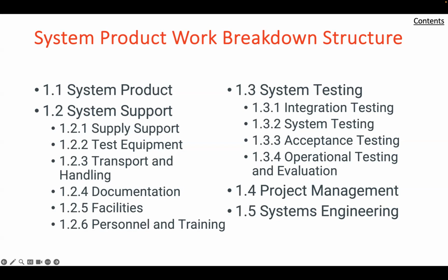Also, decisions have been made, at least tentatively, regarding outside procurement of elements of the system. Accordingly, the level down to which the WBS needs to be defined in detail should have been established. It is, of course, to be expected that the details of the WBS evolve and change as the system is further engineered. However, its main outline should remain stable.